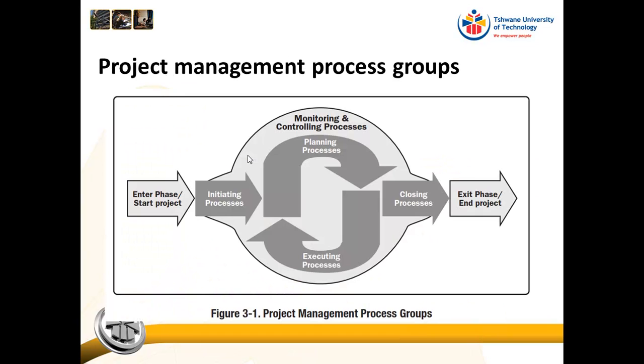Because remember that we normally do the initiation via a project charter, and all that the project charter is, is a document that authorizes the project manager to expend organizational resources on the project, and in this case on this phase, which is the design phase.